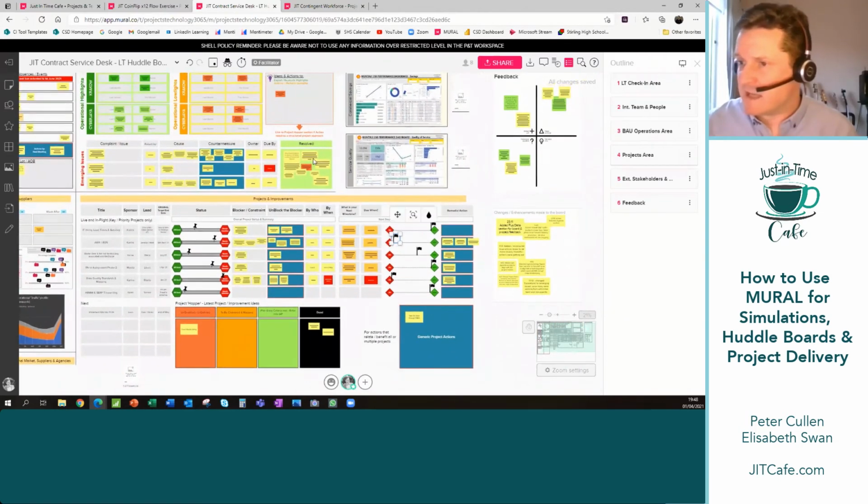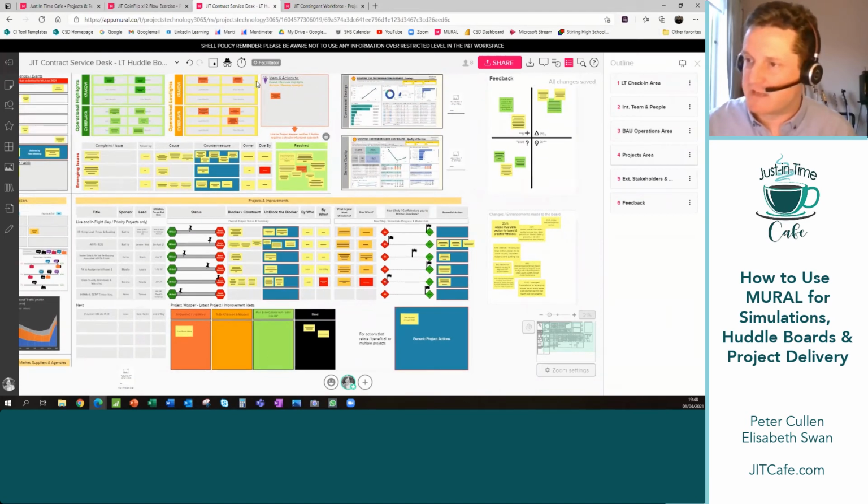A couple of added things: there's an inherent linkage between the section at the top here and the projects piece. So if we see the same operational lowlights month after month, or the same emerging issue over and over again and struggling to be resolved, then that flips down into this bottom section and becomes a project, to actually have some proper structure put behind it and to be dealt with properly. Okay, and that becomes your project pipeline for new ideas, new projects and improvement areas.